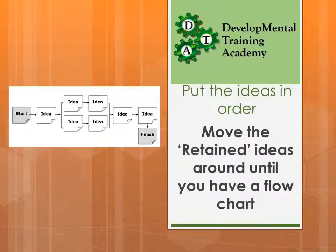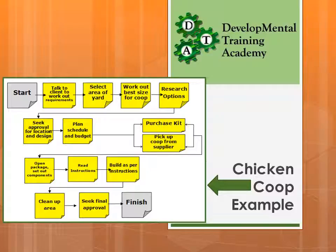You'll notice that this one has some ideas that are actually occurring at the same time. Looking at our chicken coop, we've got all of our ideas in order. We'll start with talking to our client to work out the requirements, perhaps our kids, select the area of the yard, work out the size, and so on through to purchasing and picking up our chicken coop from the supplier, setting it out, reading the instructions, building it, cleaning up the area, and then getting final approval from the client.